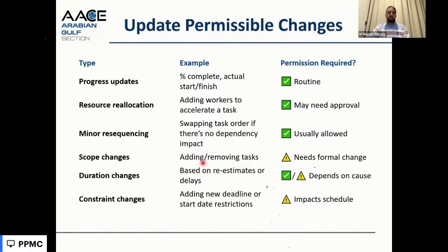For the duration and remaining duration, there is a limitation to change the durations, and we should not play a lot with them. We need to change them appropriately, proportional to the percent complete of the activity. So we cannot exaggerate the remaining duration and destroy the whole original calculation of the project or the schedule and critical path. The constraints also cannot be changed without approval.